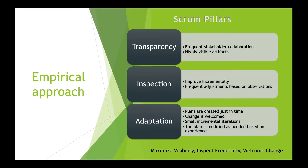Adaptation means that changes are welcome. In contrast to the waterfall approach, where adherence to the unchanging plan is paramount, the plan changes frequently based on experience each iteration. Detailed plans for each iteration are built just in time in order to maximize and leverage knowledge gained during the previous iteration.